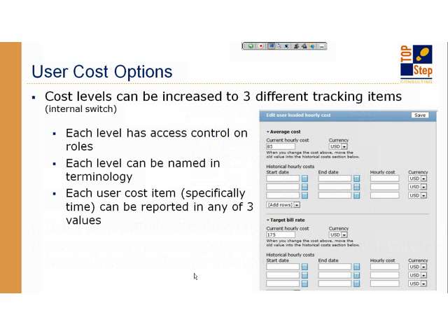Typically people jump to, well, I'll just do it, it's salary times 1.2 or something like that to account for benefits and office space and equipment and so forth. So you get some approximate of the salary. But then the person on the other shoulder says, well, you really don't want people to see that, because if they find out what the factor is, they'll be able to work backwards and find out the person's salary. We really can't expose that kind of information to people lower than the management level.